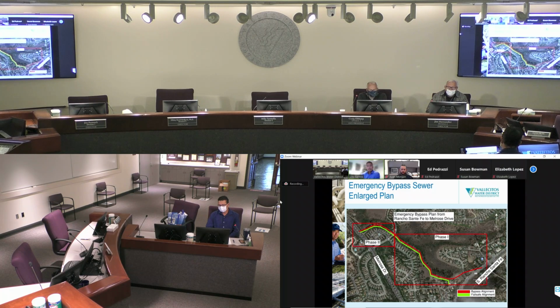The current projected budget for this, or the engineer's budget, is 1.7 million. We currently have about 3.2 million budgeted and designed through planning, designing, and construction. We plan to complete design and bid documents and begin advertising early January, and have a bid walk about late January, and then bid opening early February, award about second meeting in February or first meeting in March.